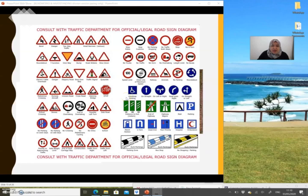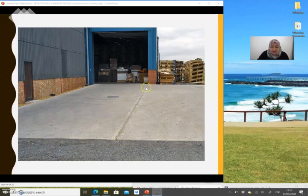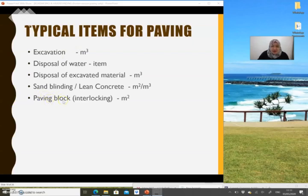Now let's look at rigid pavement. Rigid pavement comes in pieces and has expansion joints. The items for rigid pavement include excavations, disposal of water, disposal of excavated material, fillings if applicable, sand lining, and lean concrete for the base. If you are using sand lining the unit is meter square; if you are using lean concrete according to Section F, it should be meter cube.